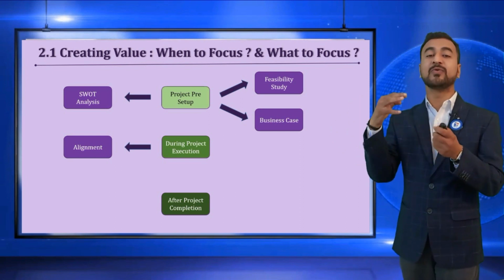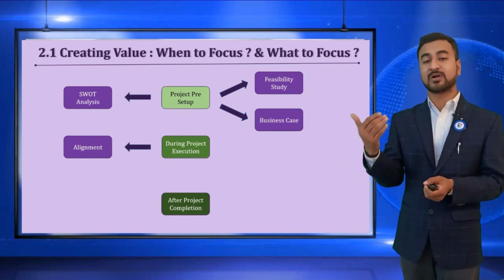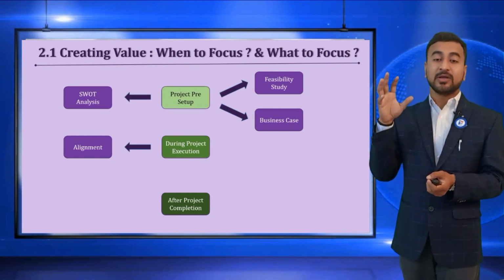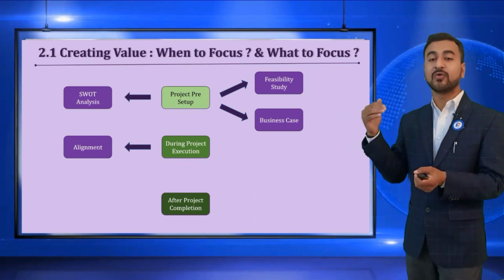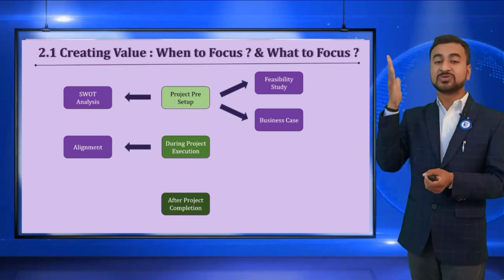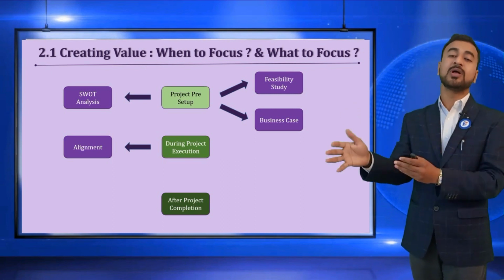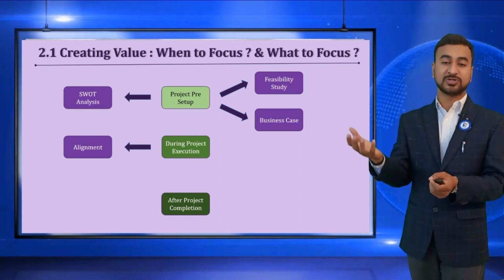So they transform: how can we develop an IT-enabled capability to provide a virtual classroom kind of setup? In that case, your project of creating school buildings is no longer valid for your organization's strategic objectives. Ideally, you should scrap that project and invest those funds into the infrastructure where you're creating IT-enabling services or virtual classrooms.